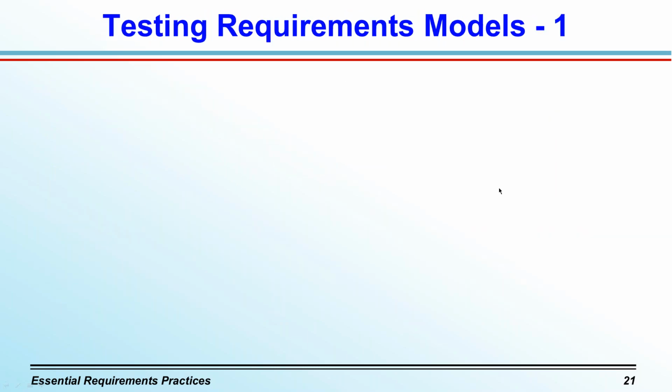Now, here's another way you can use test thinking to validate your requirements, again, before writing any code. Suppose you've drawn a model to complement some of your textual requirements. You can trace the logical execution path on the model with a highlighter pen as you walk through the tests and see if the system would behave as you expect. After you go through all the tests with your highlighter, look for some problems.